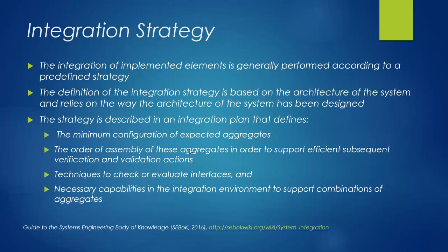A plan will be developed to describe the integration strategy and to define the minimum configuration of expected aggregates, the order of assembly of these aggregates in order to support efficient subsequent verification and validation actions, techniques to check or evaluate interfaces, and necessary capabilities in the integration environment to support the purpose of combining these elements.